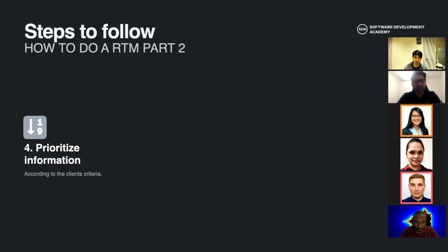We will not be able to add this new functionality on time, so we need to prioritize something more. And the most important part that you use the platform for is to add the study, to check the study links. So we prioritize that one first. And then once the study material link was done, then we create the login system.